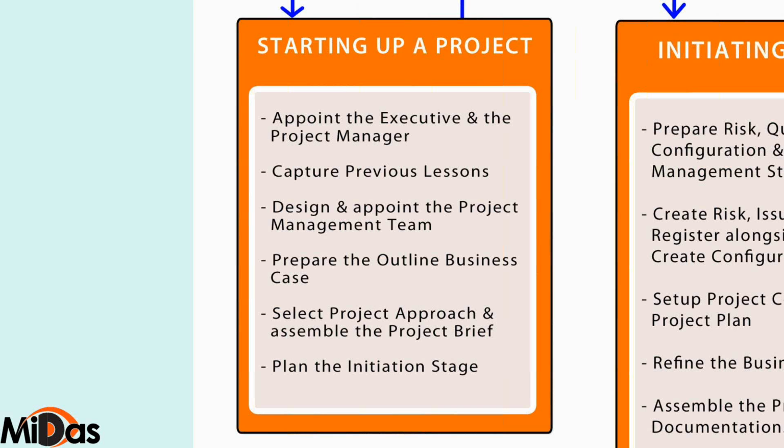Okay, now we have something concrete that we can achieve by this project. Is it a good idea to go ahead? Do you give me the approval? So he'll assemble a project brief and give it to the project board, and he'll also plan what he's going to do in the next stage, right? So basically, this is what we have to achieve, and this is my plan for how we'll achieve it. So we submit a plan.